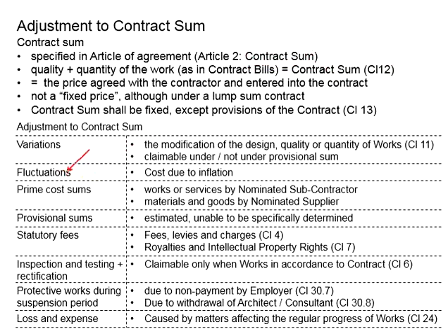Next, we talk about the fluctuations. This mainly refers to the cost of the material due to inflation. You know that a project can stretch over several years. Whichever price and rate being proposed may be obsolete, especially if such a degree of inflation is beyond what was foreseen during the formation of the contract.